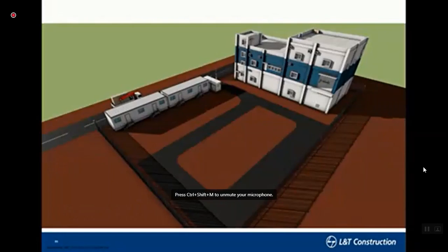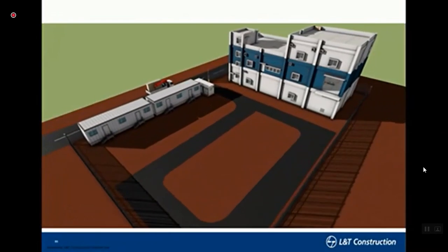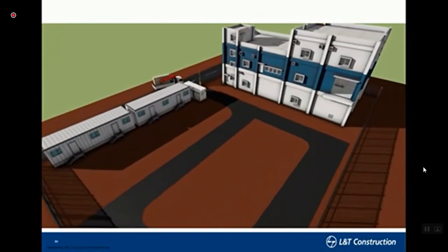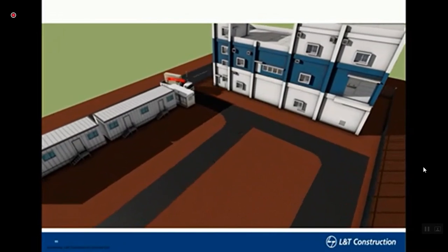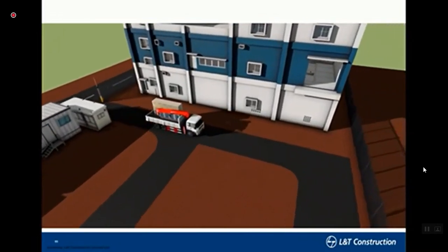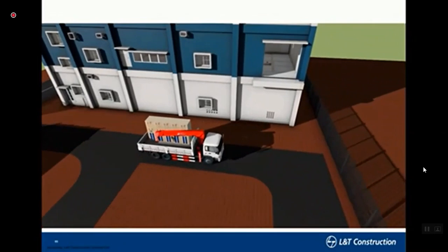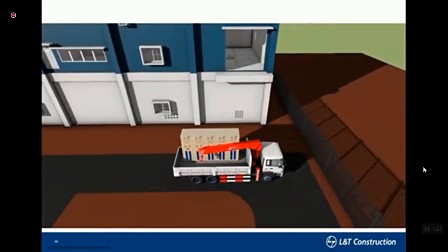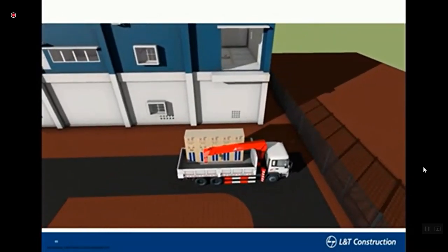Here, in this substation, for example, I want to show how an equipment is getting erected. You could plan the logistics of how these are brought, from where you will lift, and there could be some temporary slabs erected on some projects, or there could be a projected slab where you will keep it.